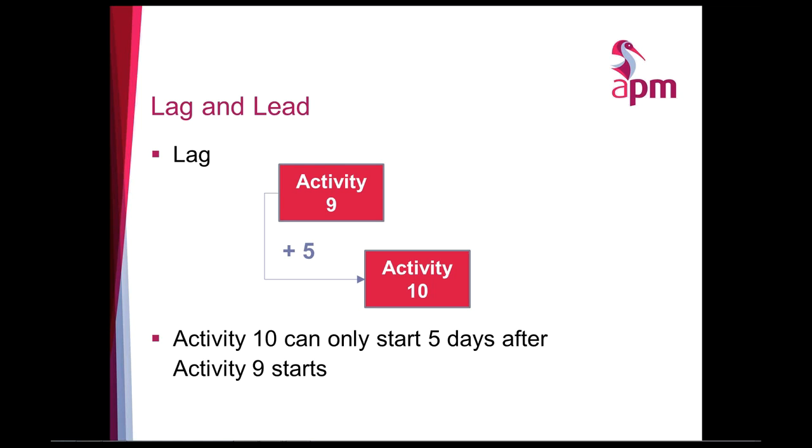I think I'd just add to the point you made about it sometimes being considered bad practice. There might be a number of reasons for that. Probably the principal one is that in a complicated schedule, it's quite difficult to actually see lag. When the network is put into a schedule, it may appear on a bar chart, and you can clearly see where activities take place. It's a lot harder to see and understand where the lag is. So that's one reason why it might be considered poor practice. Okay, right, thanks for that.